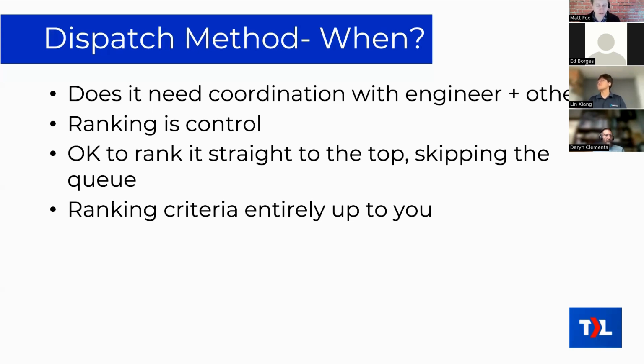Now, just a couple notes about how the engineers work here. I mentioned it briefly, and we'll talk about it a lot more in the fourth session. But engineers, like I said, work from the top of their queue, or from the top of the team queue. If they have both the team and the personal queue, then they would work from their queue first. When it's empty of work, then they would work from the team queue.